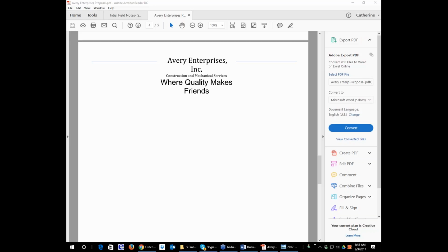Okay, we've got one number come up. Okay, so Tom said 250,000. Amy said she's not that good yet to do this. Oni said $175. All right. Okay, so now Tom, your number is a little bit high. 250 is a little pricey for what they're trying to do. I don't think I need 250 because I'm not having to do any exterior work. 175, including contingency, is where I came in at. Philadelphia is very cheap to do construction. That's why a lot of investors are buying here, because construction costs are very low.